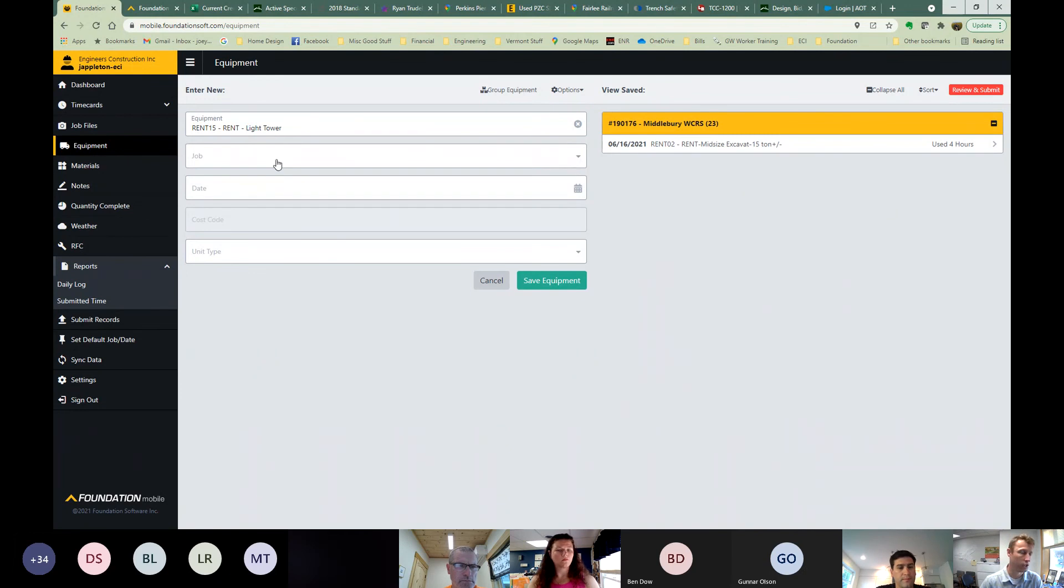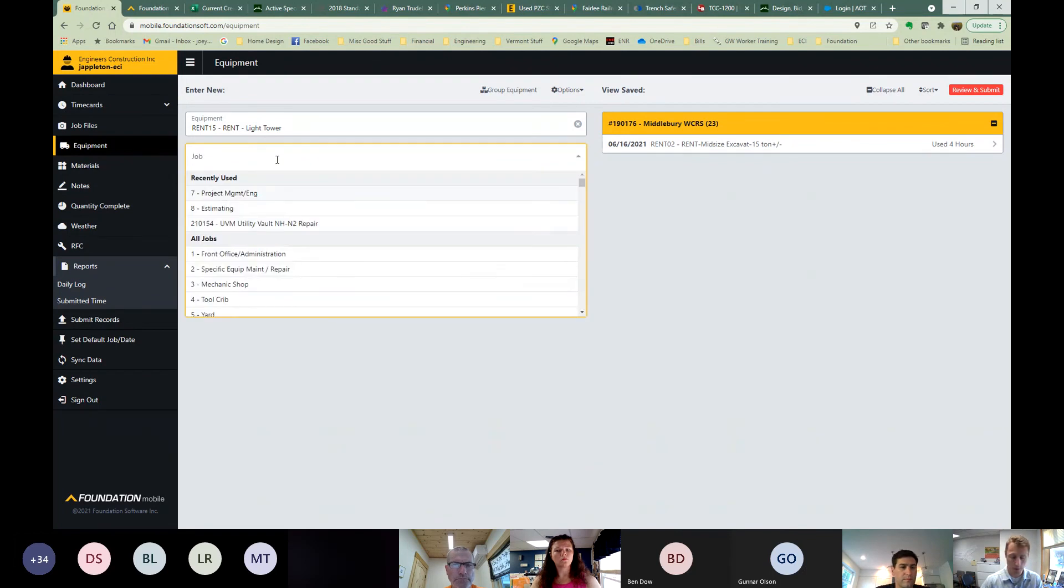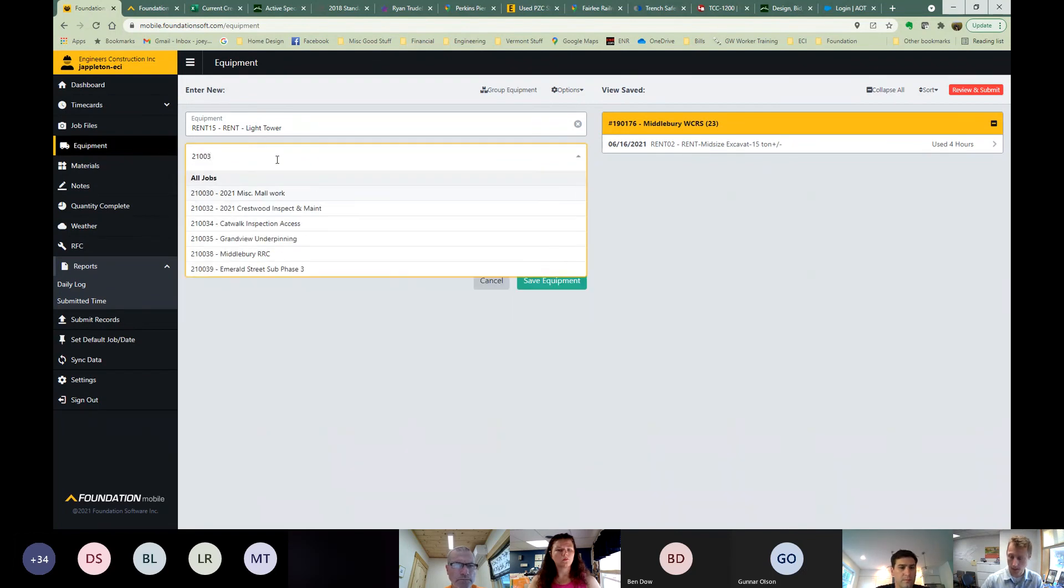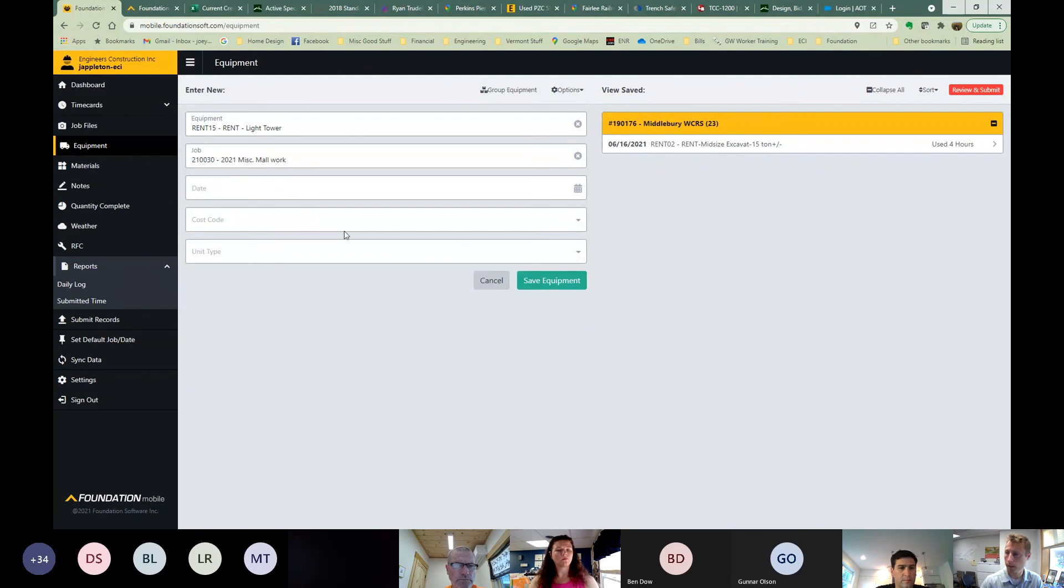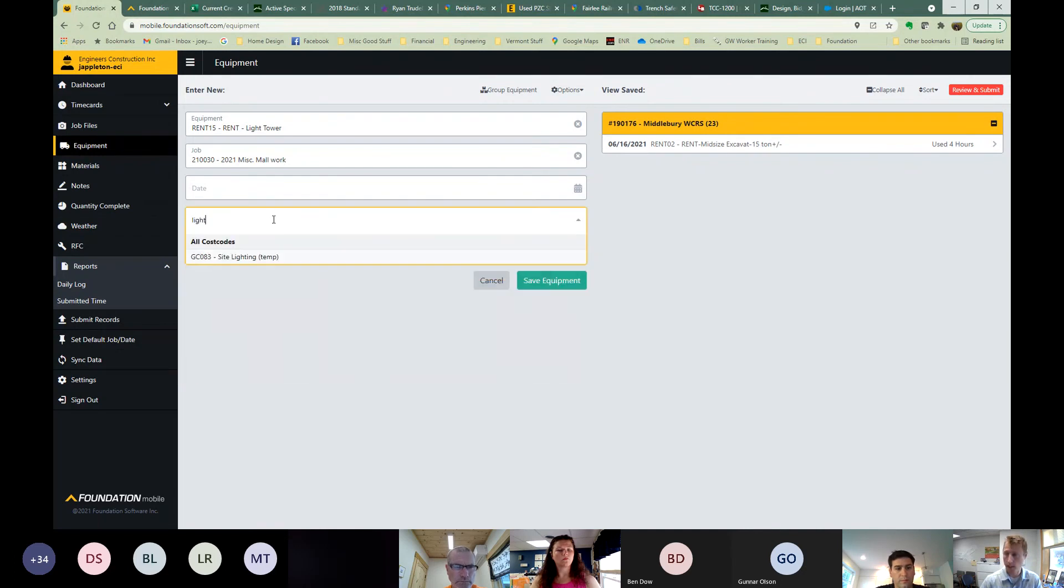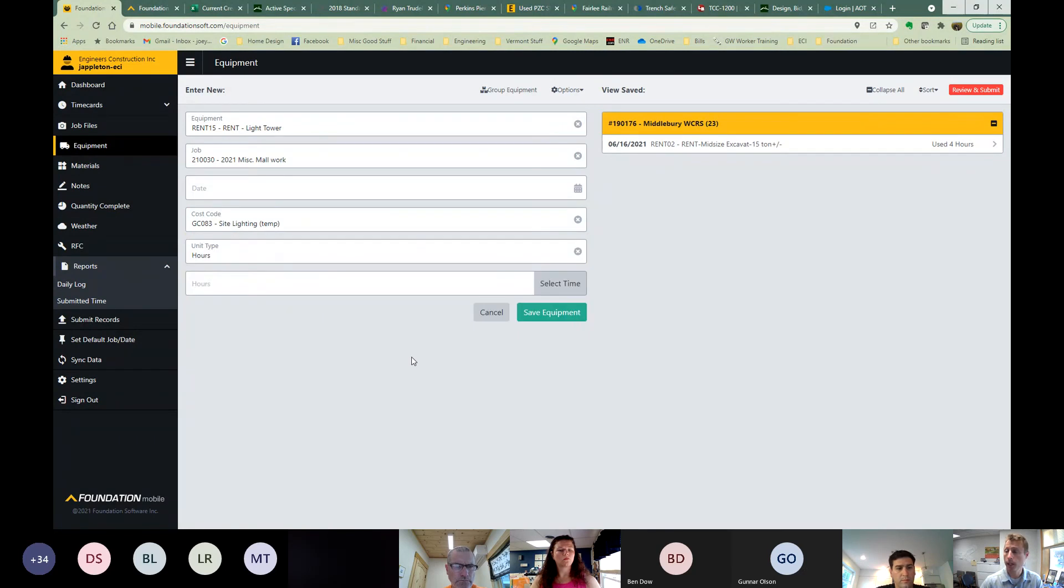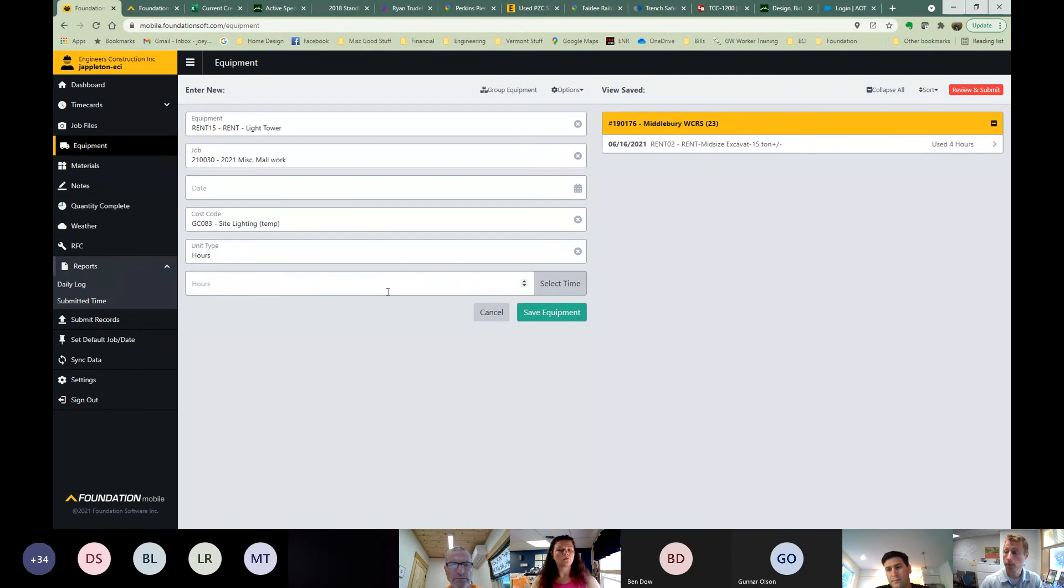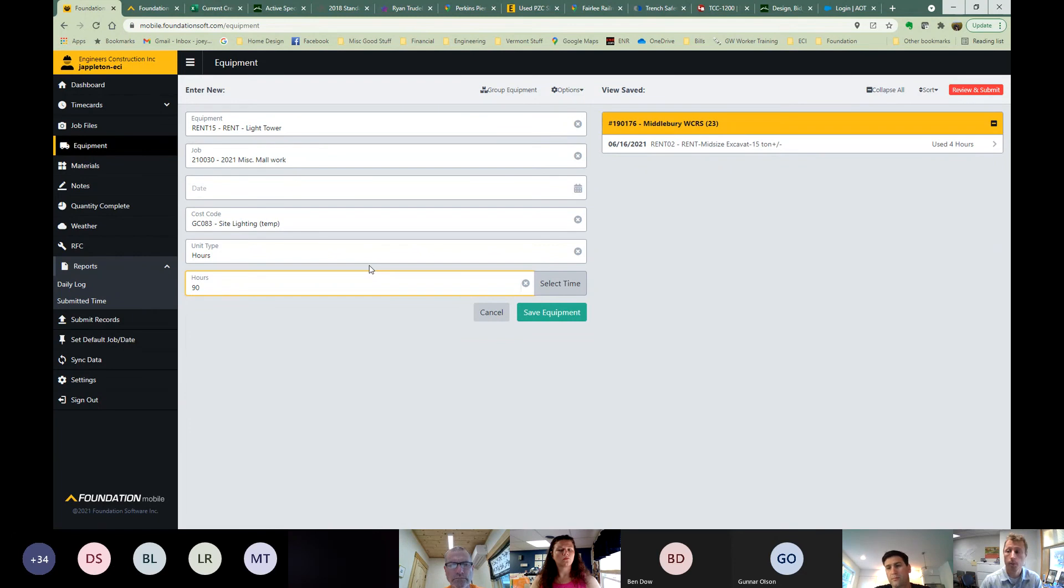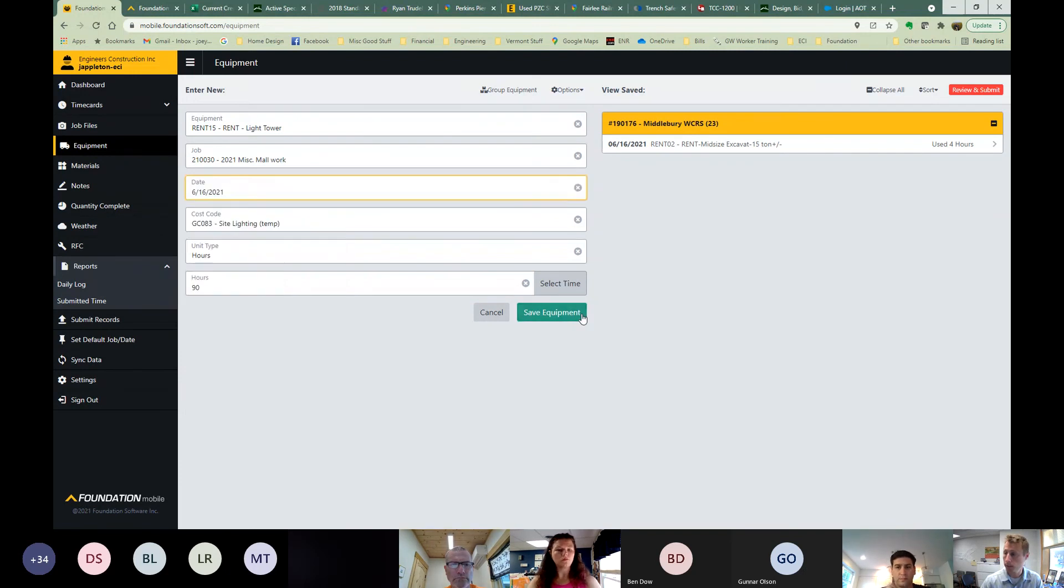Some of the jobs, like the Shelburne Road job right now, for example, it's got dozens of light towers on it. We've got some other jobs coming up where we've got a lot of light towers. So we can also make sure we're tracking that because when those are running consecutively through the nights, it consumes quite a bit of fuel and we want to make sure we account for that. In your cost code, in this case, maybe we have a site lighting cost code and then a unit type can be hours. And maybe we have 10 light towers running nine hours a night. We can do 10 times 90. And for this one day, we could actually put in 90 hours. It's 90 total hours representing all of the equipment. So we don't need to put one entry in for each light tower, for example, and try to keep it simple. And we can save that.